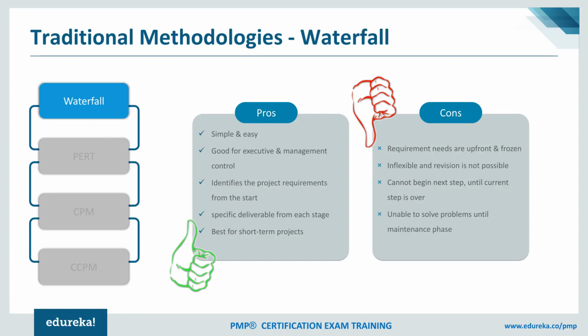A few cons could be: requirements are upfront and frozen. Once the requirements are frozen, obviously there wasn't much flexibility in terms of adding any new requirement once the requirement phase is done and you move into design. And if you identify defects or any change during the verification stage, it was really difficult to come back all the way to design, make changes, and then make changes into the build.